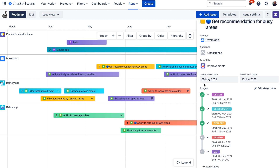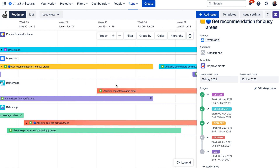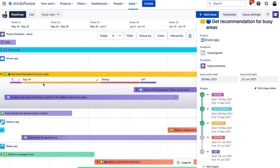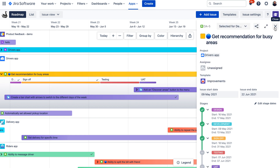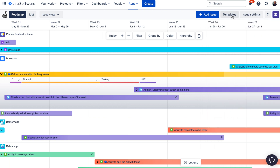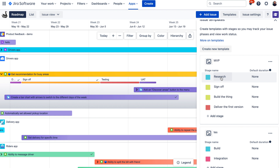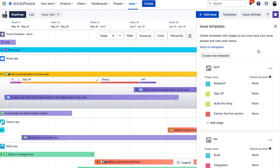You probably noticed the section called Templates. Templates in Swanly allow you to create stages that can be used as high-level milestones for your issue — you can track their status and visualize them on the roadmap. So if you want to track milestones or phases of your initiatives, you can use templates and stages for that. You can set up templates in the Settings. For example, there is an MVP template with stages like research, sign-off, delivering, and so on. Each phase can also have a default duration, which you can fill in if you already know how much time you'll spend on each stage.